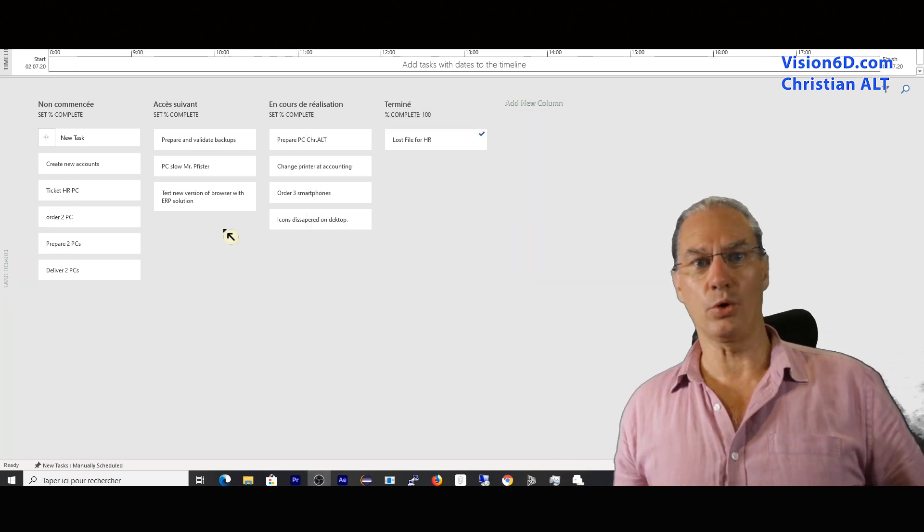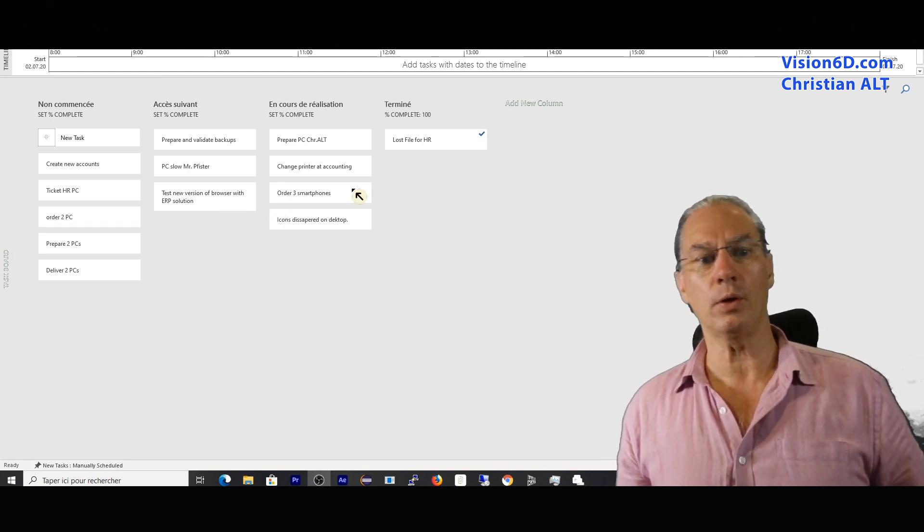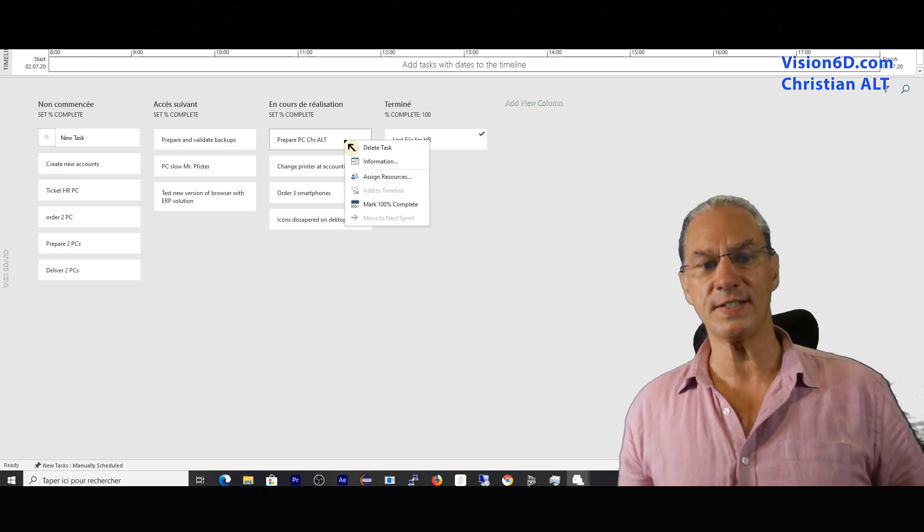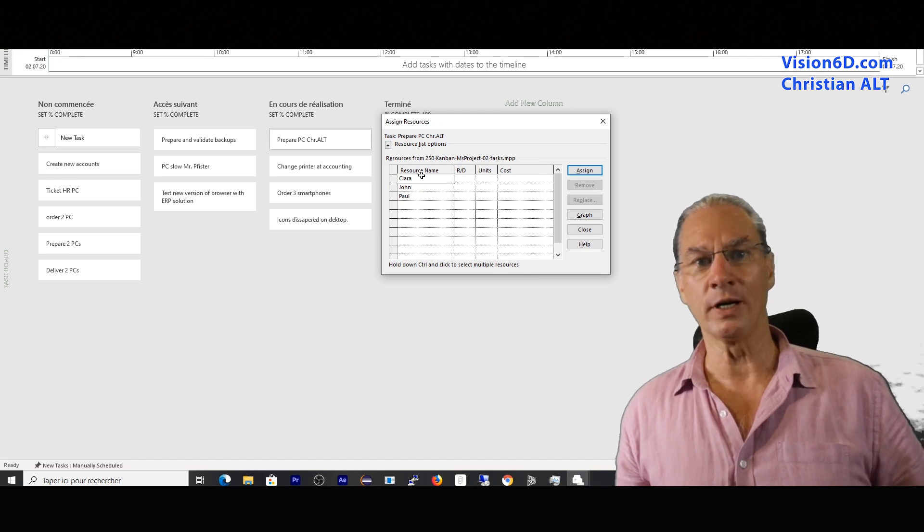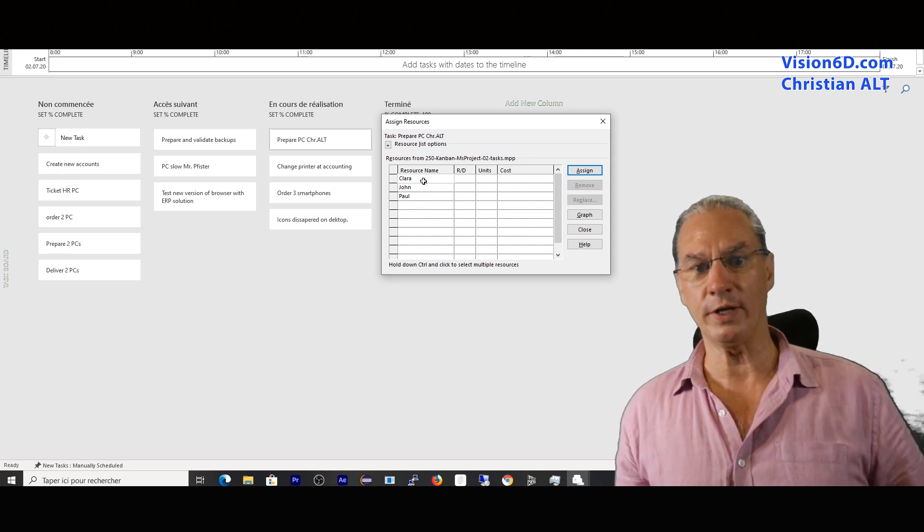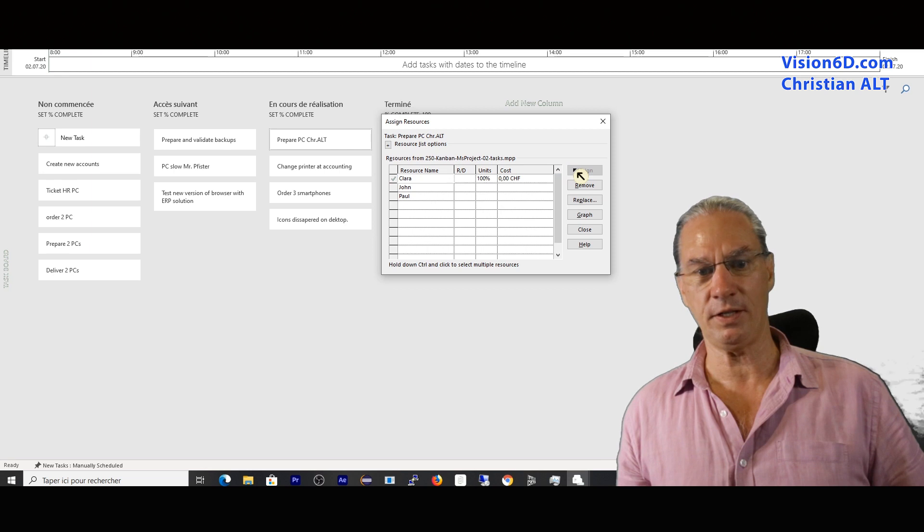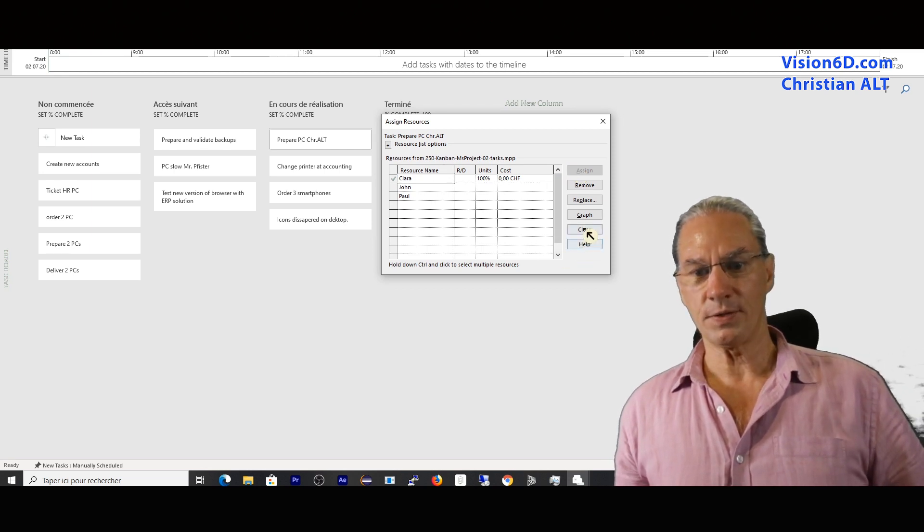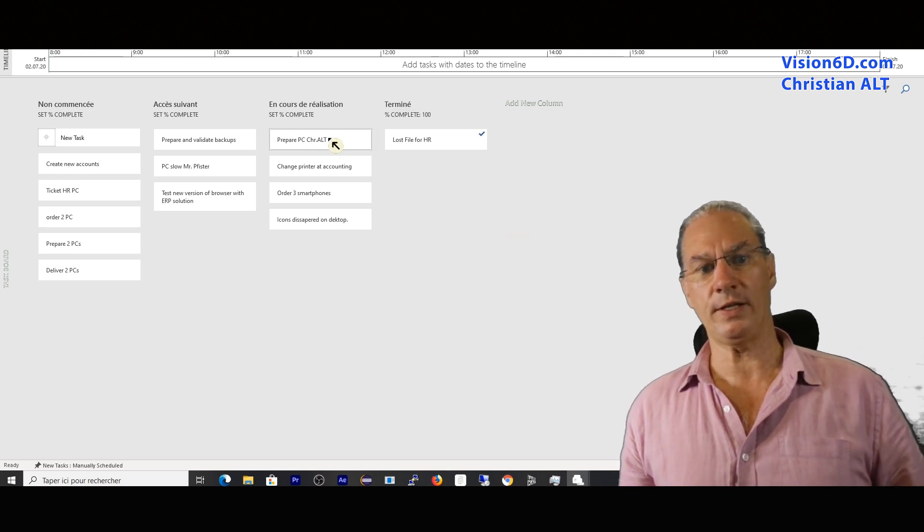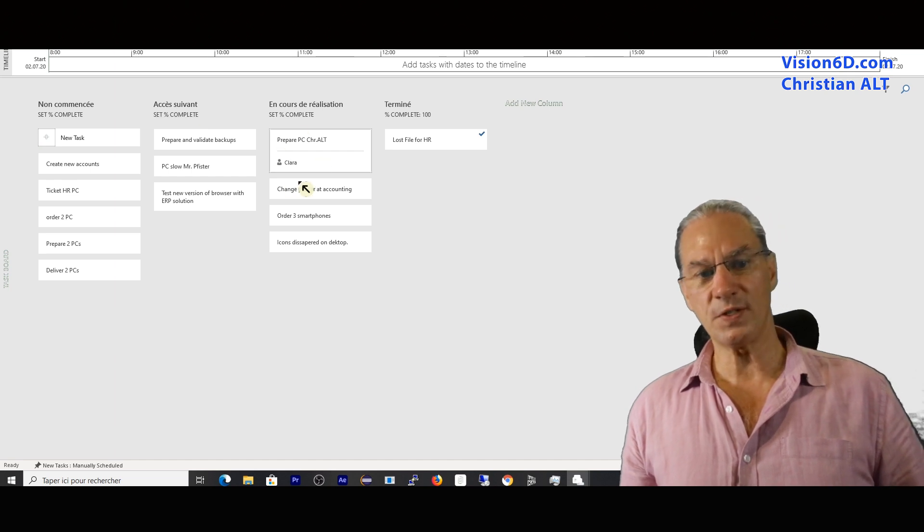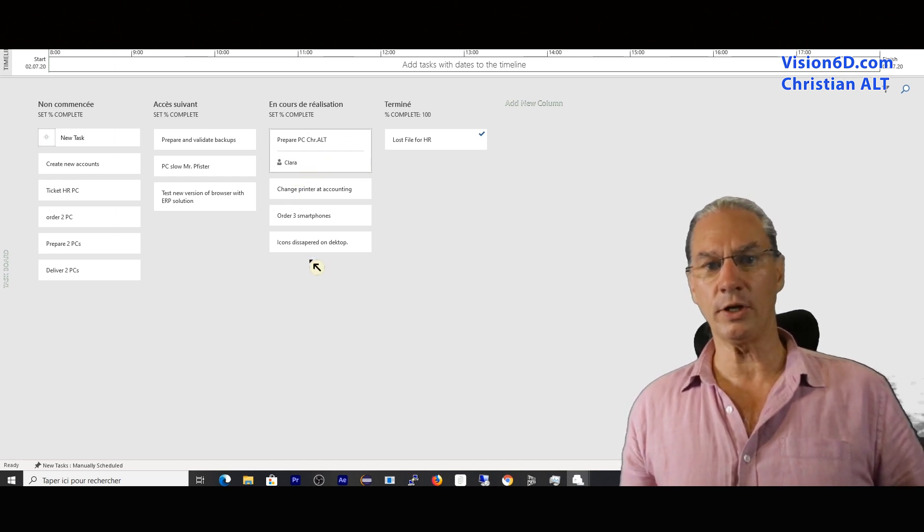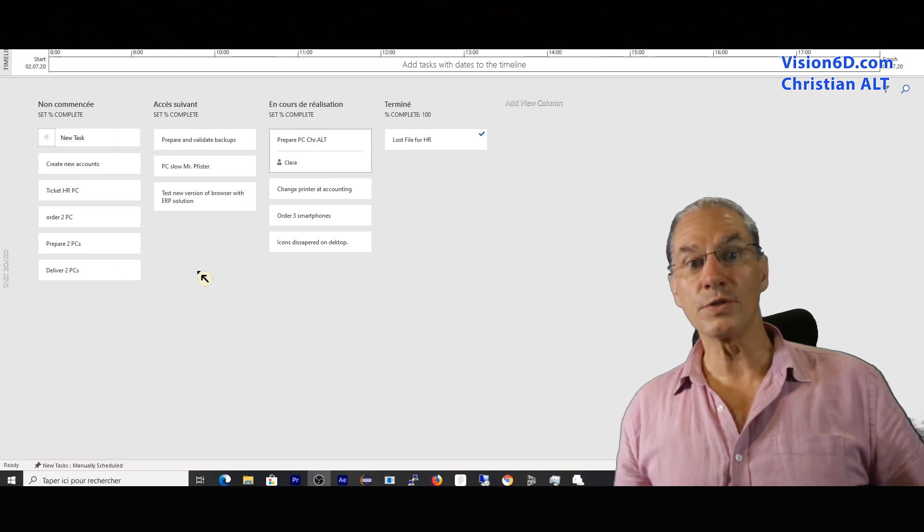The task board gives us a really good overview of what's going on. What we don't see is who is doing what. For this, we have the possibility, if I select that part here, to assign a resource. If I go into assigning a resource, I have here my three resources from the support team - it's Clara, John, and Paul. And Clara is a really friendly woman. She is the one preparing the PC for Christian. So I will select Clara and say assign here. You see, it's been selected. I can now close and we'll see what happens. Nothing happens because I should have done this already one step ahead. But if I pull it back here, you see that the name comes out. We can here at one view see what's going on and who is assigned to which task.